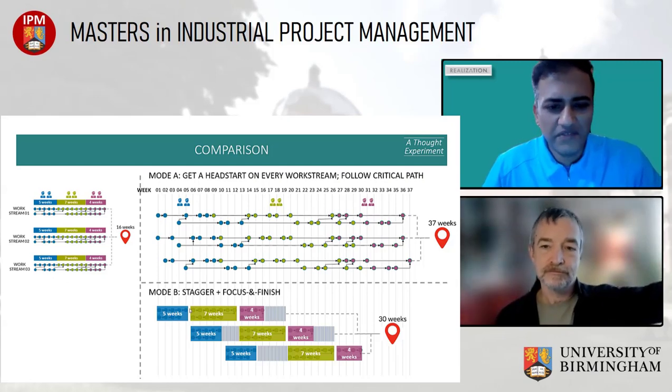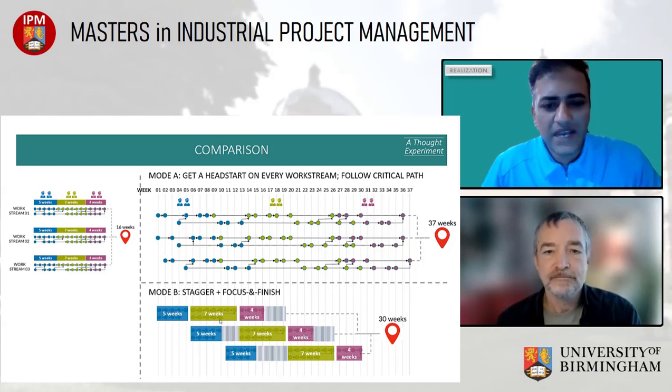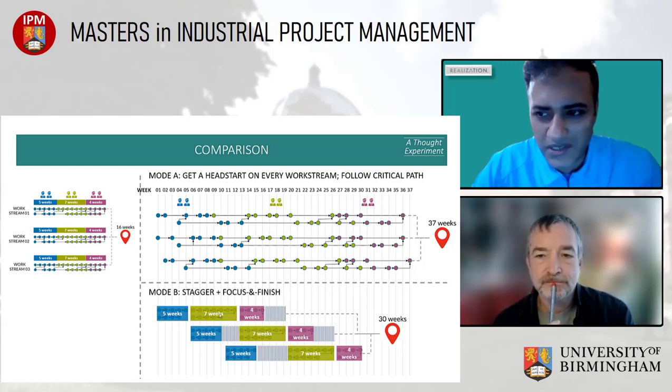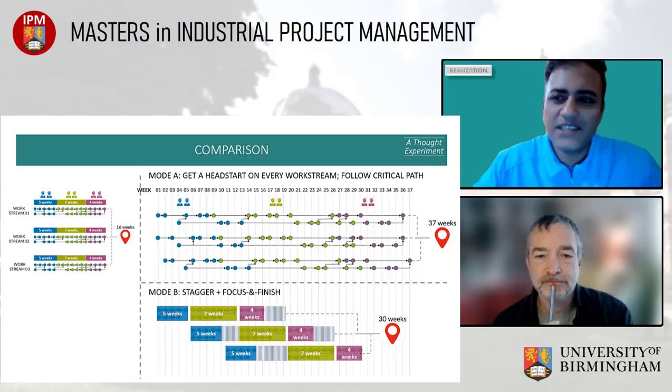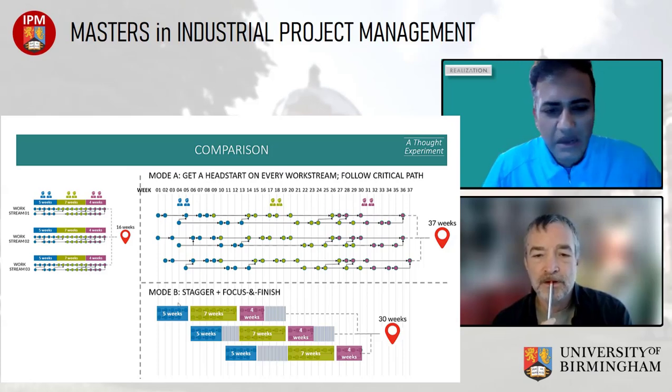And there what we showed last time is that if we create batches of work, which I'm going to show in the software, and we don't bother about when this drawing is required, we just focus on the batch and close it and finish it and keep going ahead, then it leads to much better results. And how are we avoiding the problem? If you look at the original network that I'm showing here, there are integration points that are running in parallel.